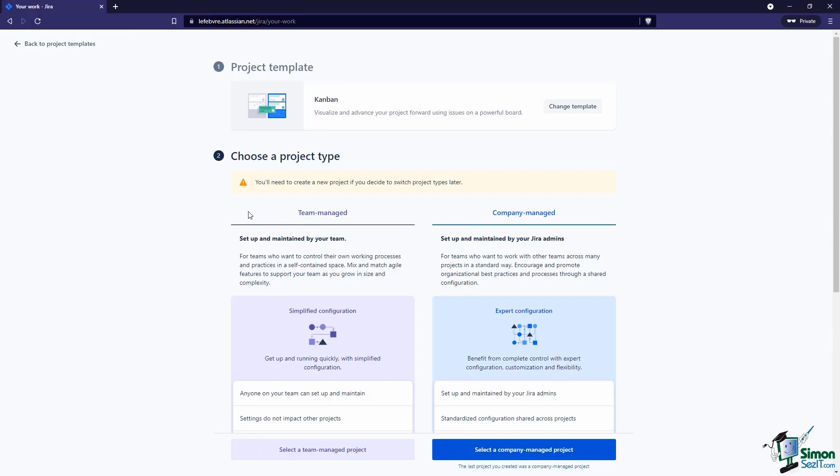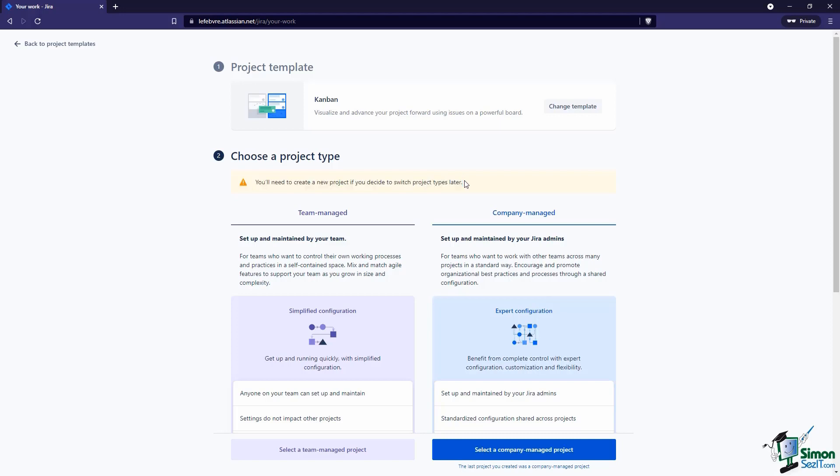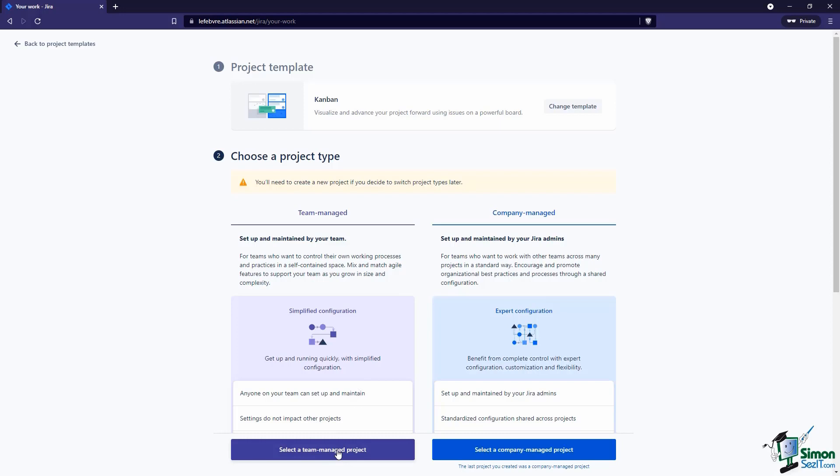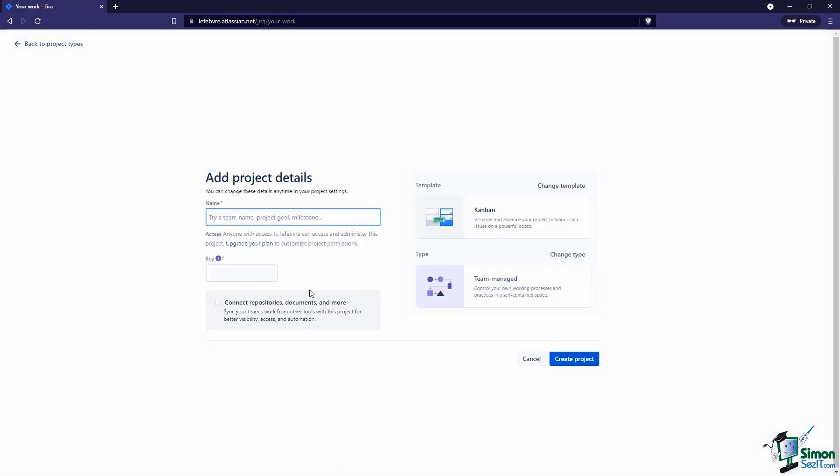Let's go ahead and use this template. The key thing to point out here is really this part right here. When we create this project, if we create it as a team-managed project, we cannot switch that to a company-managed project later on. We have to create a whole new project to do that, and the same is true if we create a company-managed project. Let's select our team-managed project.